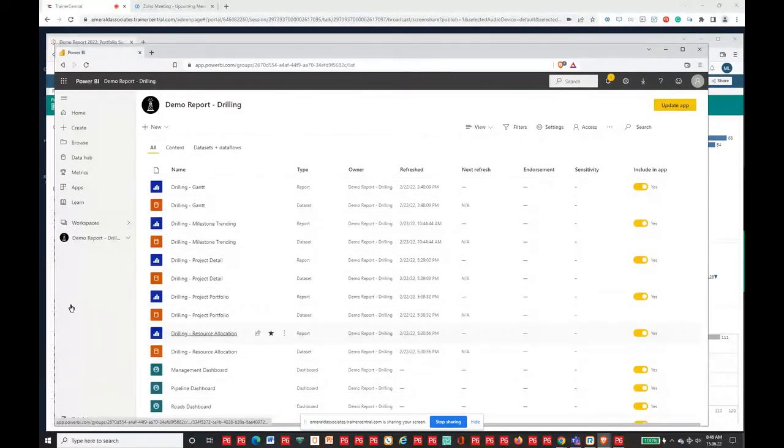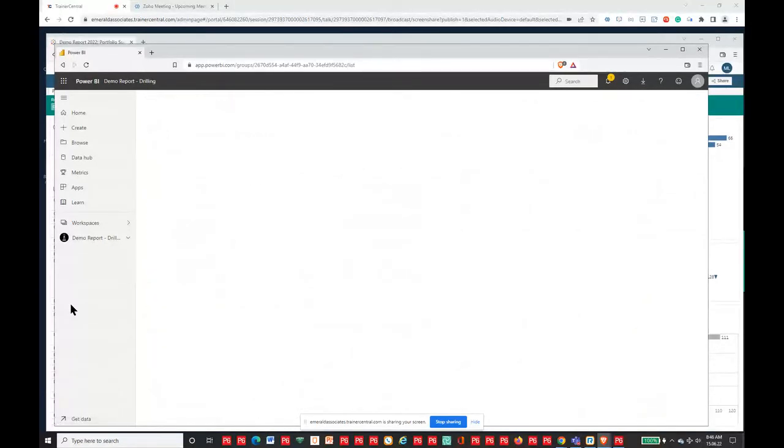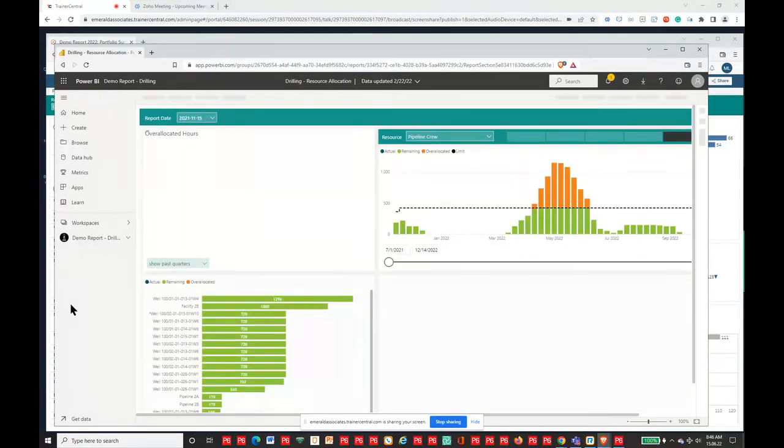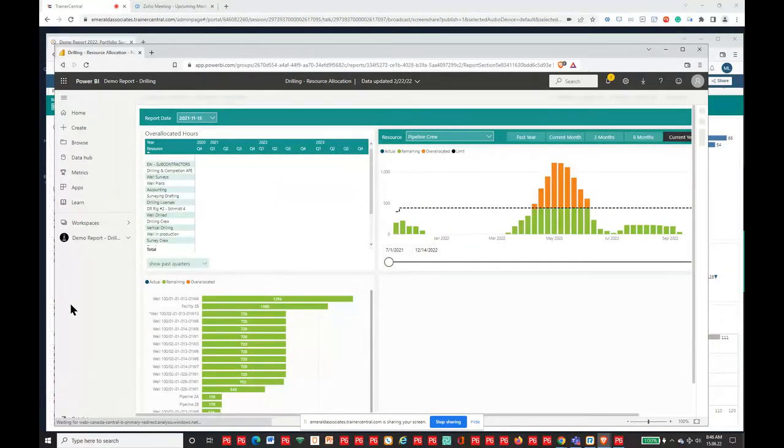Yeah. So the difference with that one that Marilyn just had up for a very short second was, within your project you're going to have lots of milestones, but there will be certain kinds of milestones that you're going to want to track. So for example, an in-service date, power on, power off dates, those sorts of things. There will always be certain ones that you want to group together and track. So that diagram had different kinds of milestones with the trend. So that's an important one.